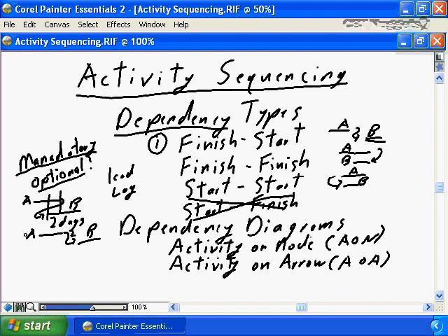For example, A is the completion of a deliverable, and the lag is the acceptance process for the deliverable to be accepted before B, the next activity, can be initiated. So work on the dependencies, ensure you have the right dependencies created for your project plan, and that only the mandatory dependencies are created will result in the simplest, easiest project dependency diagram for you to debug.